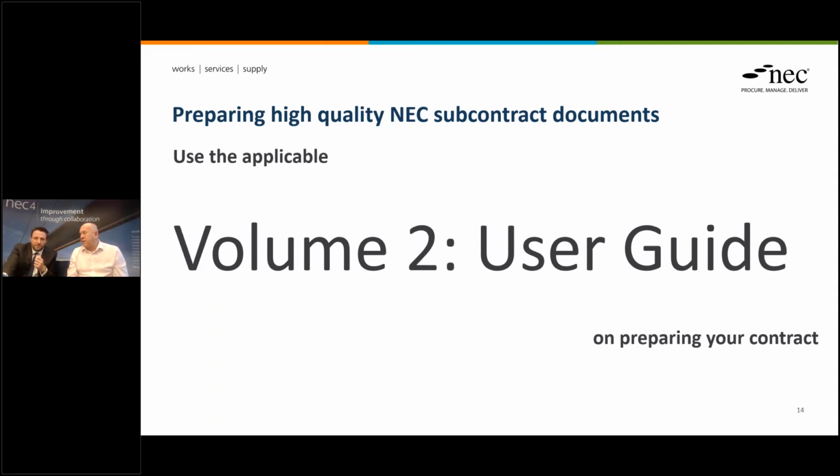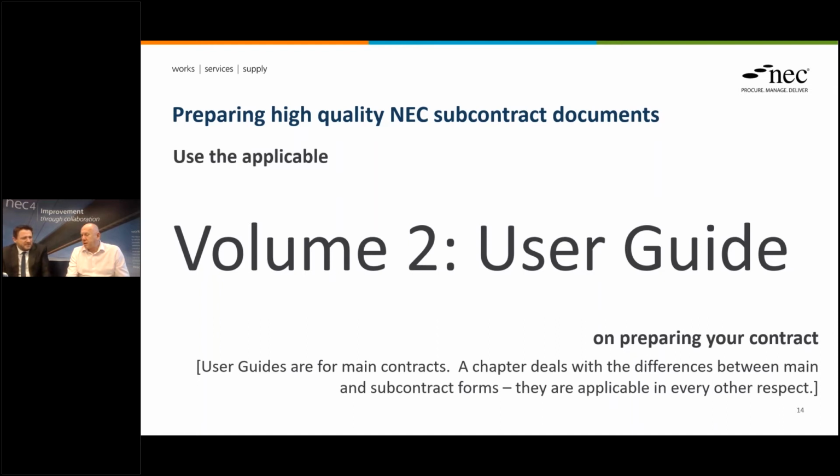The origins of that were how to prepare the works information to an ECC, which is superb guidance. There were 28 places where NEC3 used to talk about the scope. That's the works information in an NEC3 ECC. There's a lot more now. There is a lot more. We've got to understand that this is a crucial document to actually make the contract work. And much like contract data fills the blanks in, there's a huge number of places where the scope is referenced and relied upon. Scope, and if you say nothing, there is nothing. So scope is far more than just specification and drawings.